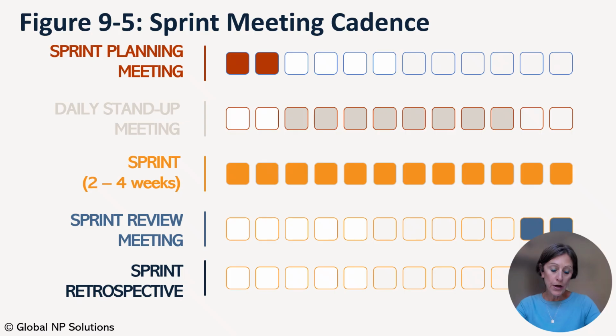Planning poker or another estimation tool is used to determine the scope of effort for the selected user stories, and the team commits to completing a given number of items from the prioritized product backlog. These items are listed on the Scrum board, sprint board, as to do, and the scale of the effort is documented on the burn down chart, often as relative story points. As the sprint progresses and the development team completes work, the remaining story points decrease with a goal of 0 residual points at the end of the sprint.